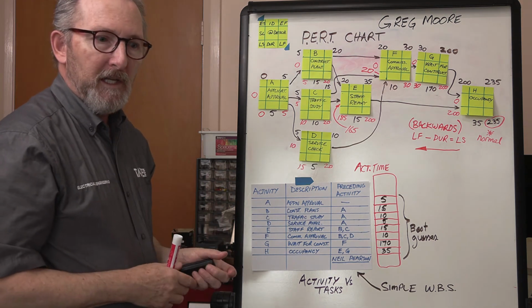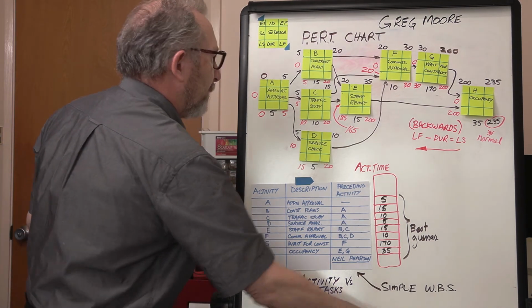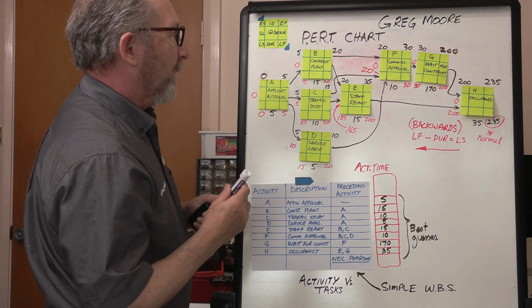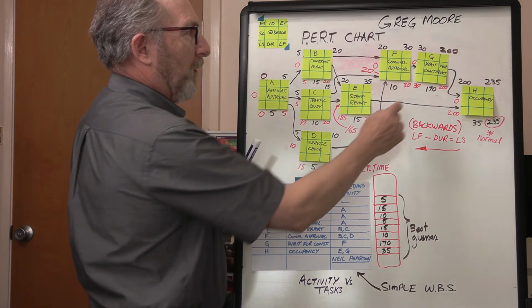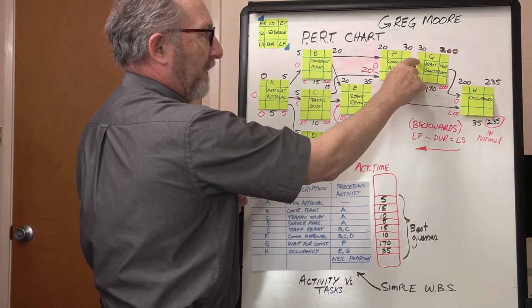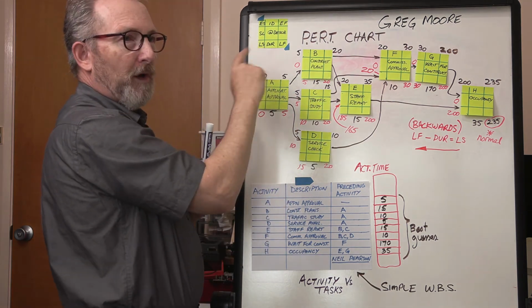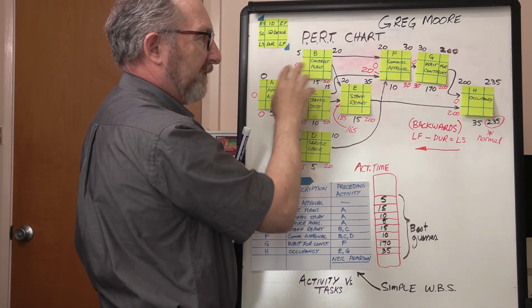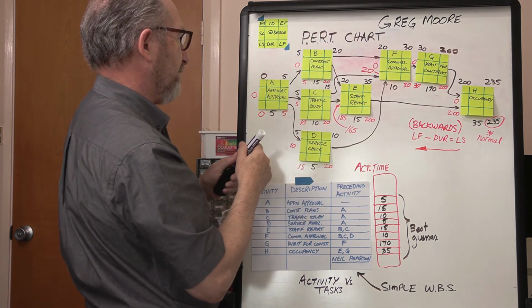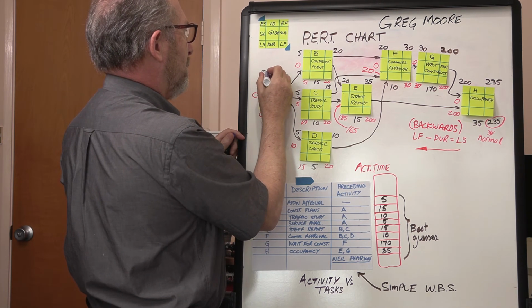Now let's have a look at the critical path. The critical path is going to be where we have the same values in EF and LF, or no float, no slack time. Sometimes this slack time is called float. So if we just discount the squares that have got float, the critical path will be all of the other squares. So the critical path includes from here,